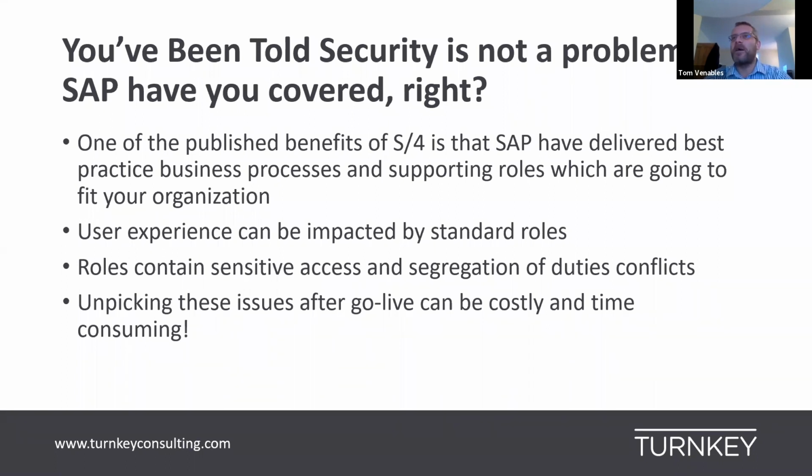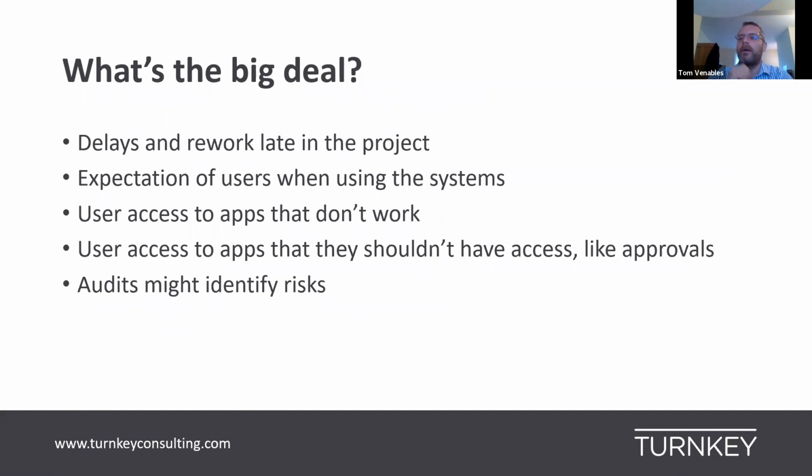If you start finding them after, you've got to go back and unpick all your designs. So again, there's that regret cost if you don't get involved early and understand that you're going to have to expend that effort. So the big deal to you, the reason that you need to expose this is because otherwise you're going to have delays and rework late in the project.